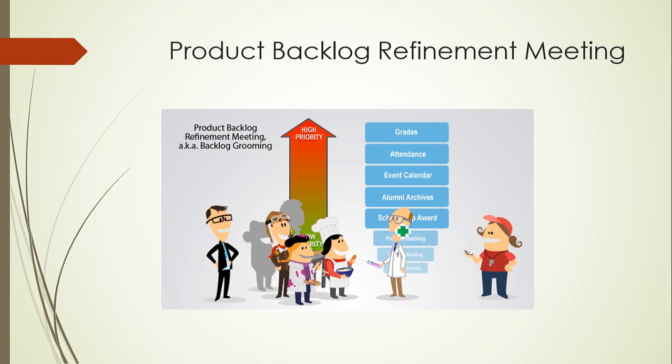In this meeting, user stories are sized using the affinity sizing estimation technique, where ballpark figures are provided. And if a user story is quite large, then it is broken into multiple user stories, and the parent user story can be called an epic.